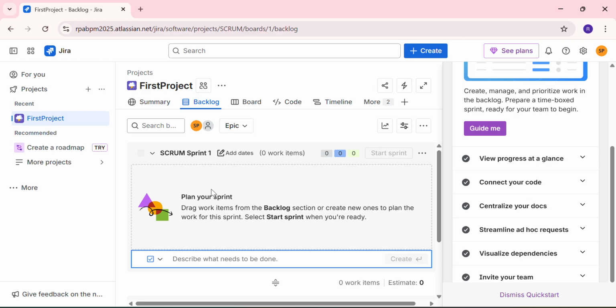Okay. So every time we'll be having a sprint. Every 2 weeks we'll be creating one sprint, and we'll be dividing our user stories into multiple sprints. For example, we have 100 user stories. For all 100 user stories, we will divide those into multiple sprints. Let's consider 20 user stories in a sprint, which means we'll be running 5 sprints. In each sprint, 20 user stories will be developed and delivered in that particular sprint.